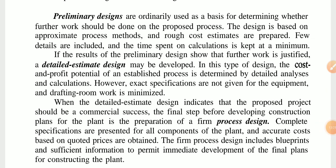The preliminary design is used as a basis for determining whether future work should be done on the proposed processes. The design is based on approximate process methods, and rough cost estimates are prepared. Few details are included and the time spent on calculations is kept to the minimum.